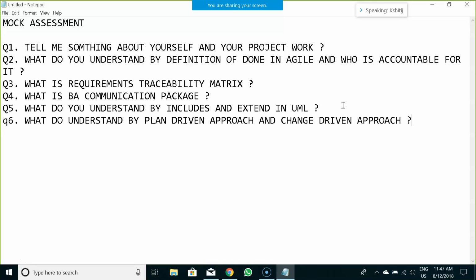On the other hand, the plan-driven approach is the waterfall method, where the requirements don't change over time. After the requirements have been gathered, they directly go into the development phase, and change is only possible when the product has been delivered completely at the end of the project.